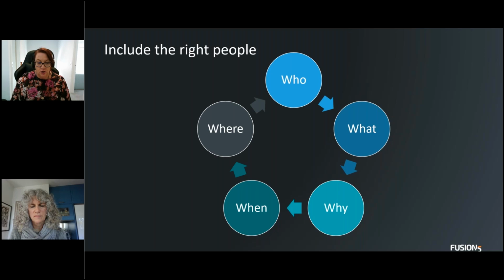If you're going to include them, when does it make sense to include them? If you're wanting the payroll manager to come along, there's no point us scheduling workshops on payroll day, or possibly even payroll week. So it starts defining that time. Also, if you're a multiple location, where are we going to run workshops? In some ways, it's great to get people away from the day-to-day so that they're away from interruptions and they can fully commit to the process. But if you're multi-location based, is online an option? Is that something that we should be looking at?